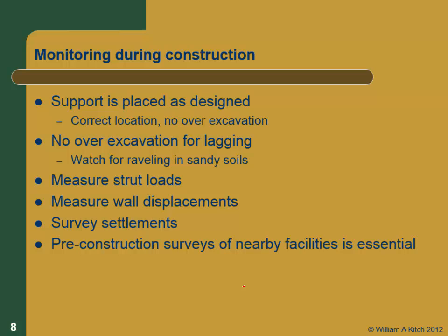And then the third person you can work for is the construction contractor, who wants to know what's going on and be sure that if there's any damage going on, he needs to know whether it's, especially if it was a design-bid-build kind of one, because somebody else might have designed the support system and they're just building it, and then if there's a deficiency in the design, they want to lay that on the designer and not on them. So this was actually a really lucrative business, because you got two or three chances to win the work. It's the same work, but for different clients, you do it differently.